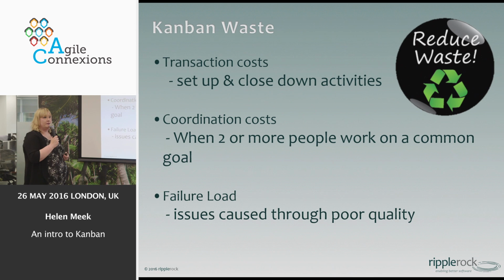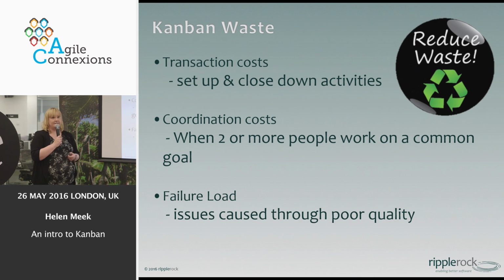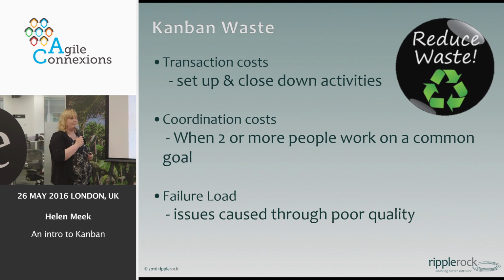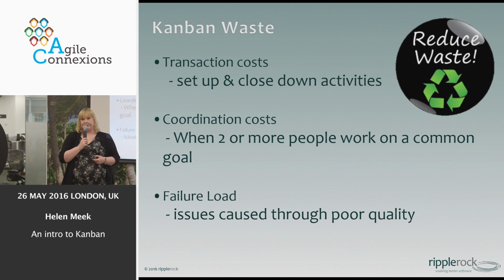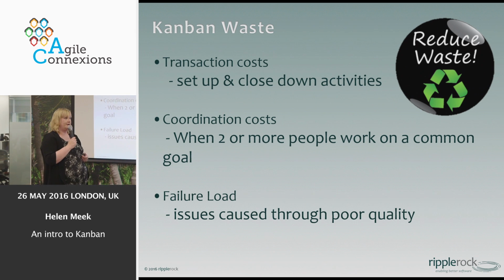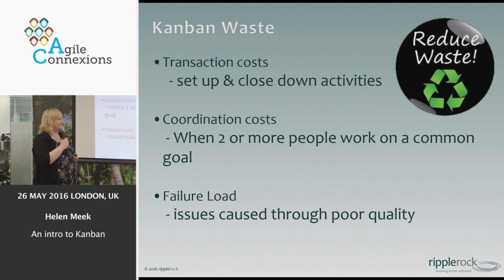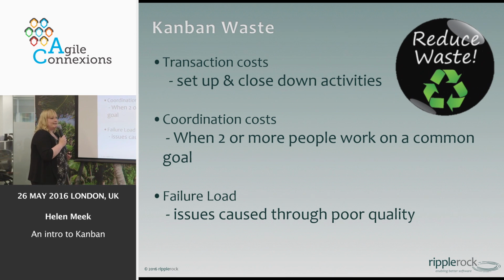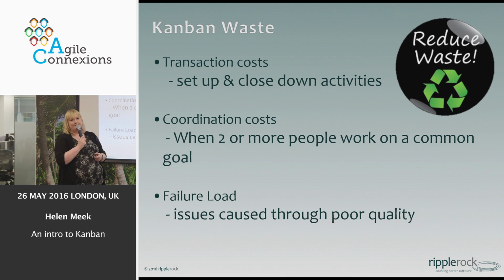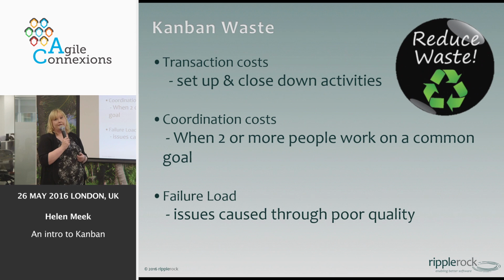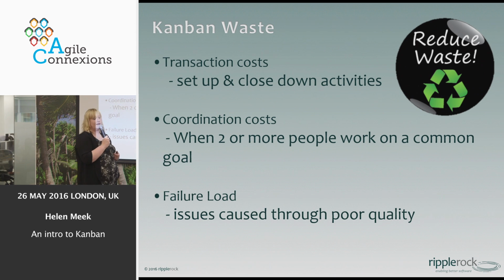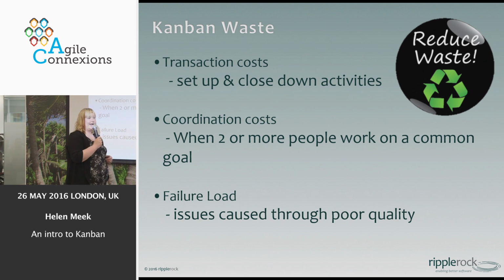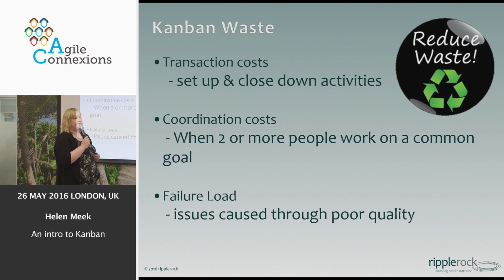Coordination cost is when I was having to do a training session to Manila the other day, and I had an hour, and I spent the first 20 minutes trying to get Skype to work. Okay, so that's a coordination cost. Failure load is those things that have gone through your team, and it's not what the person wanted, or it didn't fix the problem. These are the problems that have come back through, and we're having to fix it again, and that's waste. So again, in Kanban, we look for all of these different things.